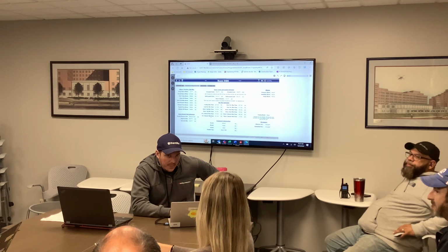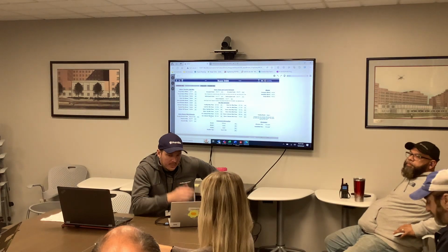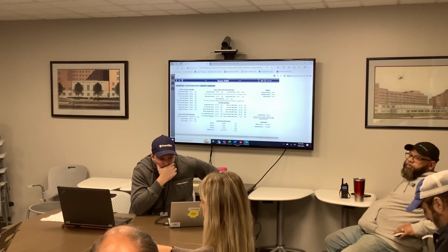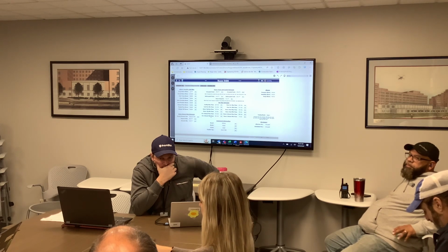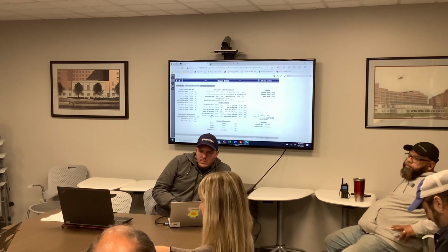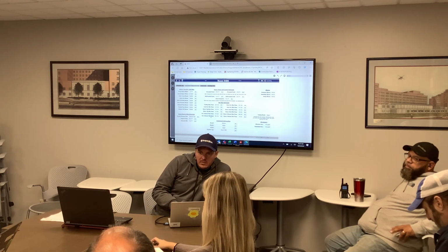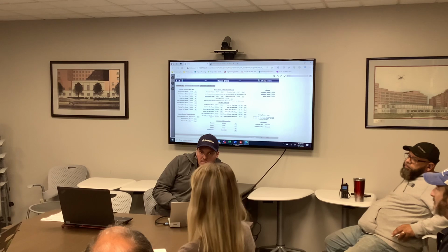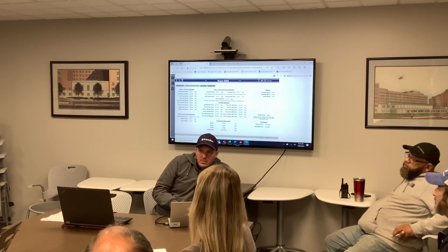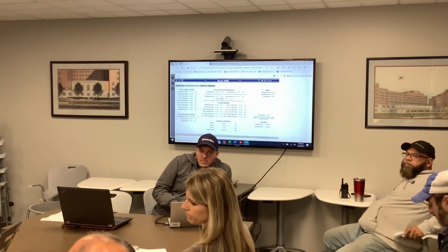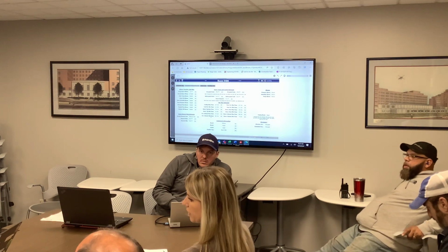Yes, we have procedure rooms that are pressurized. We have a scope staging and a scope reprocessing. The problem is the scope staging did not have the pressure sensor shown in scope, so we missed that one. But we are working with Chemtrack to get that in there. Unfortunately, you're going to have two systems. You're going to have Johnson Controls mainly, but for that one room, Chemtrack, because we're having so many issues with mods that we're taking care of it outside of the project. The scope room was always the trouble room before. Yes, and that was missed.